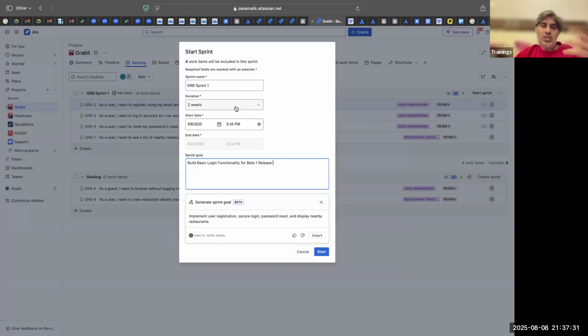So it's based on hunch, judgment, previous experience. But after 2 or 3 sprints, you will get a fair idea of what is the perfect sprint duration for these guys. And then you can maybe increase it, decrease it, and then stick to it for a considerable period of time and see how it goes.